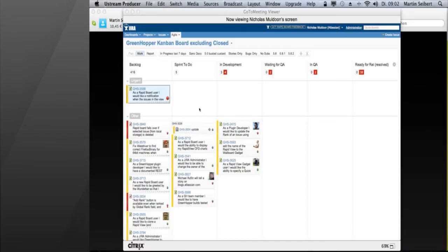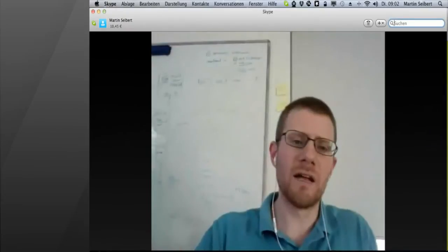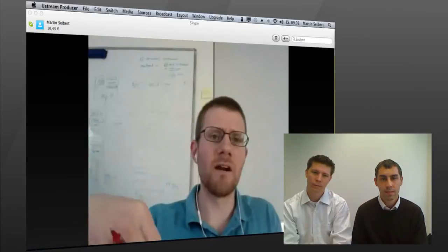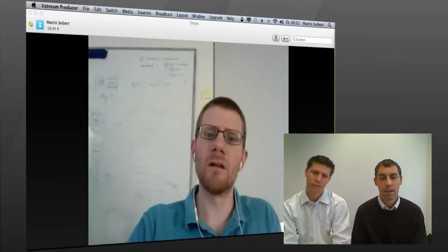Okay. Yeah, in our team we do use the swim lanes for stories. So every story has its own lane. And in the lane are the different steps to complete the story. And you watch them as they progress across from to do, in development, done. Yep, I think that's quite common. And as we look to how we build epic functionality and take the swim lanes forward, certainly for a Scrum team, then I think that's something that will come up as well. Okay. How do we support that?